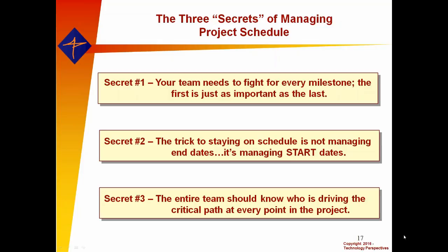Do you allow that to backlog and backlog for 3, 4, 5 days before you say, well, we've got to fix that? No, immediately you try to catch up so you get back onto your tack time. Exactly the same thing here. Milestones within a project plan represent a measure of the pace of work. And so if we slip that first milestone by any significant amount, we better be working hard to get back well by the next or the one after that.